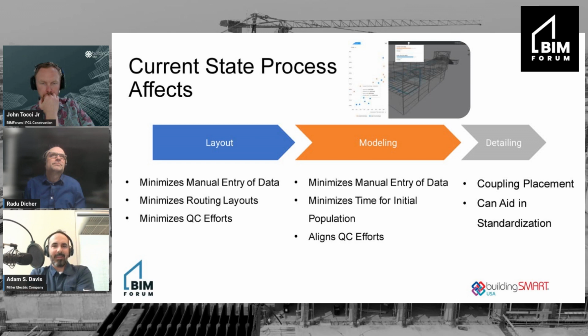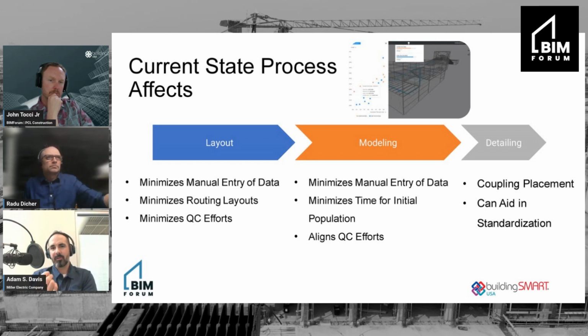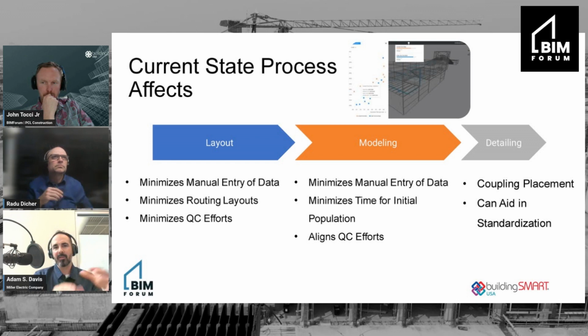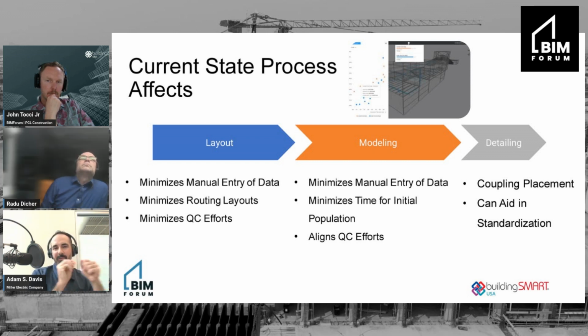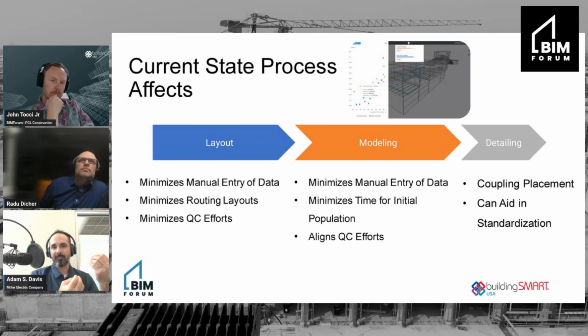So again, the process, and this is a sneak peek. This is a kind of a small slide, but I didn't want to tease it too much. It's kind of a future endeavor for the program, but you can kind of see this plot map, and on the X axis you have the cost, and on the Y axis I believe it's the labor hours, and you can look at all those different solutions that it does when it runs the scenarios. All the different solutions there come back as far as, do you want to spend more on materials, or do you want to spend less on labor?